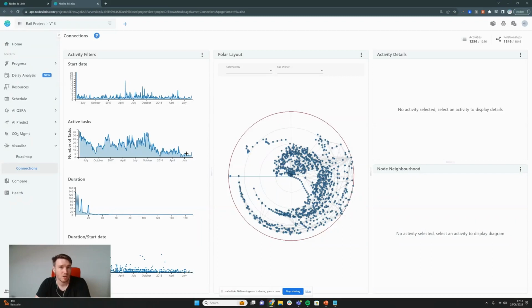This program does not have a forward wave. I know this because I've examined the program in more detail, so I've confirmed it. But here we can see that actually the active task limit is generally consistent across time and creates a nice S-curve throughout it. Obviously, commissioning and handover at the end has a lower element of activity, but in general, the bulk of the program is consistent.